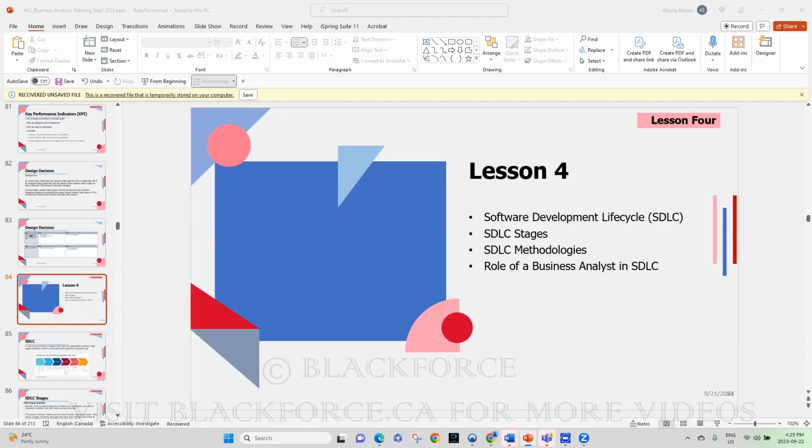So remember that the stories you're selecting into the sprint itself are the high priority ones. When they fail, they are not reducing in priority, they're still very high priority. So our priority will be to fix them. You don't return them to the product backlog. Once stories leave the product backlog, they generally don't return. They're either on this spot where we're still trying to figure it out, or they pass, and then they join the list of passed stories. But the priority is still high.